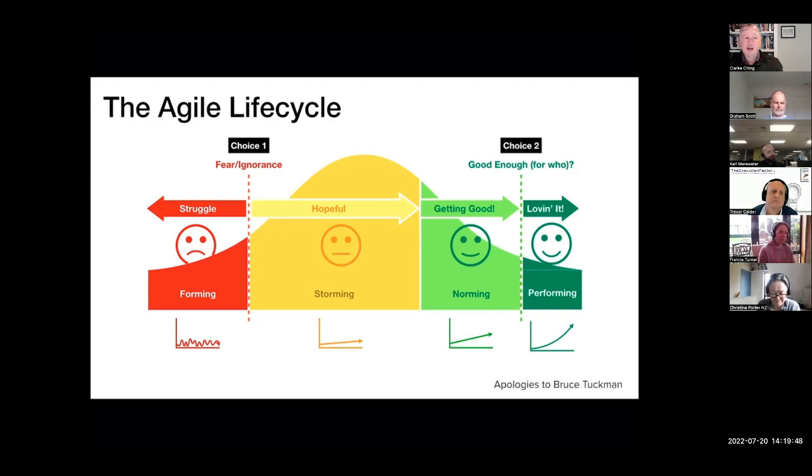And they did that. And then I came in and I helped them tidy up everything else that they were doing so they could actually deliver it on time, actually early. And they delivered this project, which only probably had the espresso and a bit more in it. The thing that they didn't do is they didn't have the espresso dollarization conversations at the beginning of the project. They had it halfway through when it was much harder to fix it. So there was quite a lot of fixed scope, but there was so much more that they could chase there.